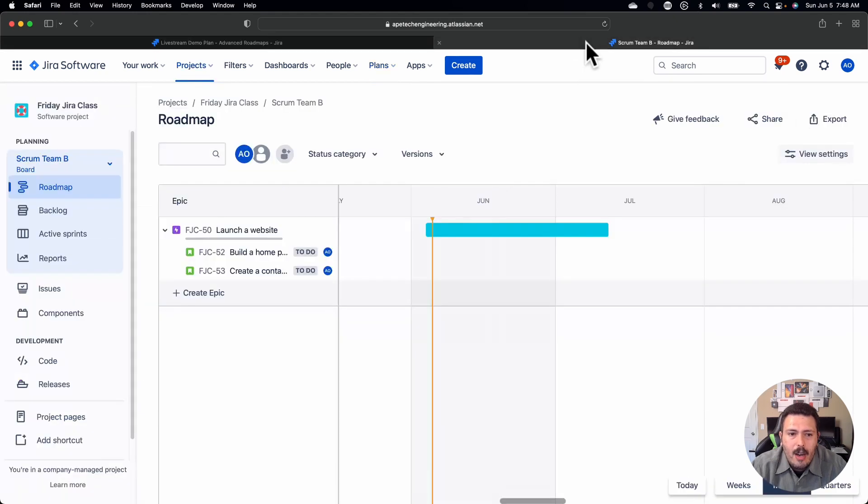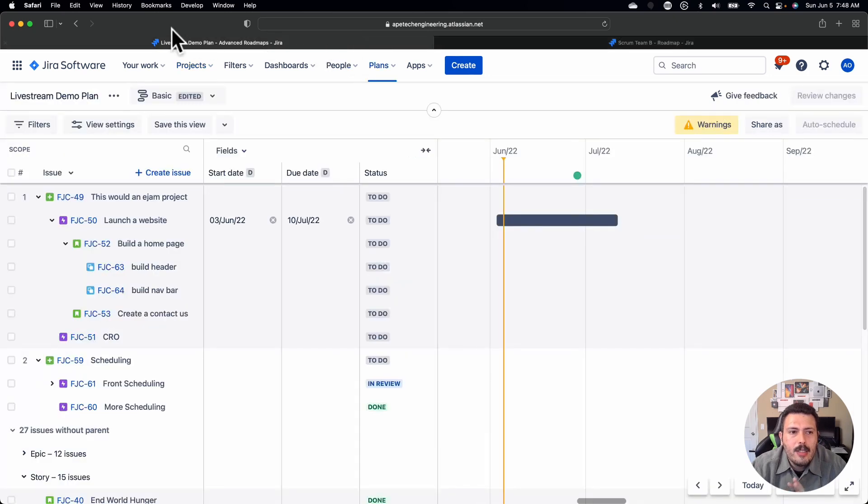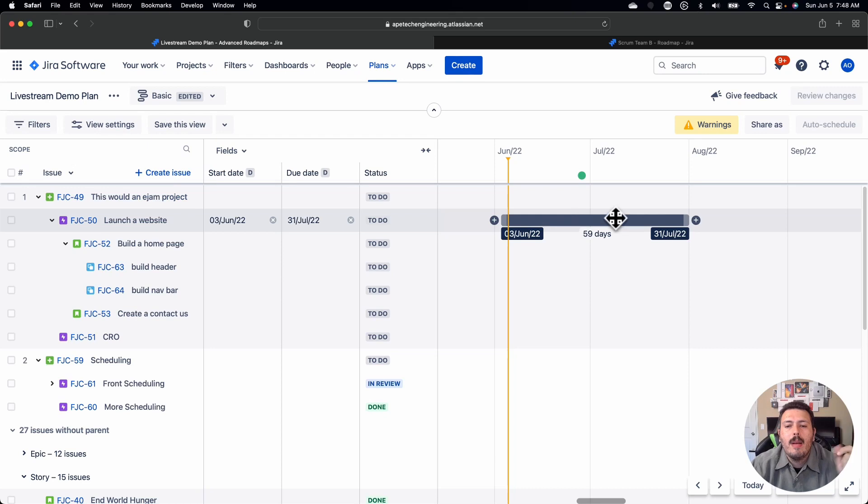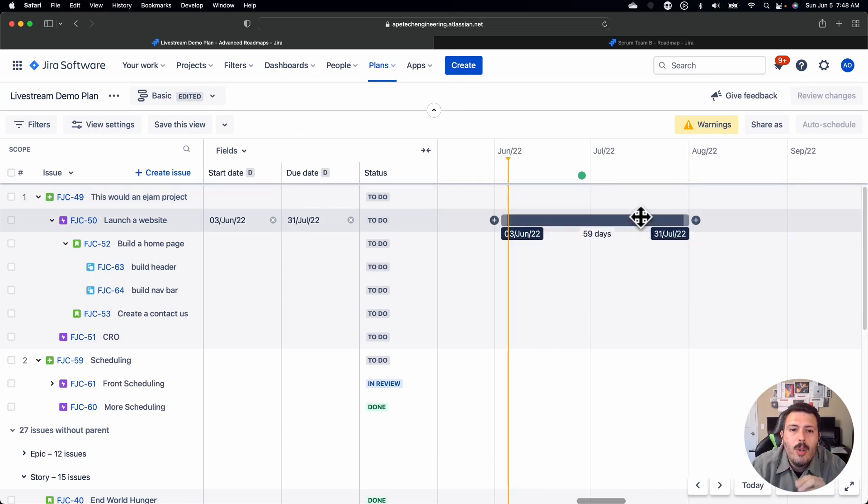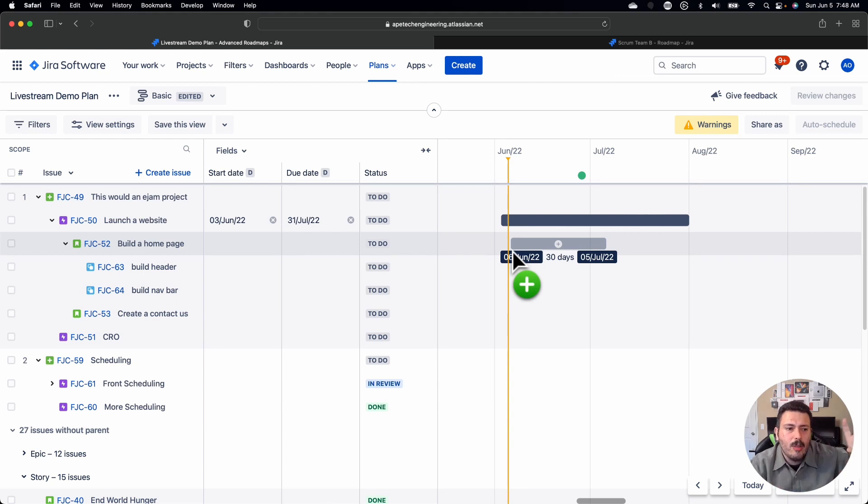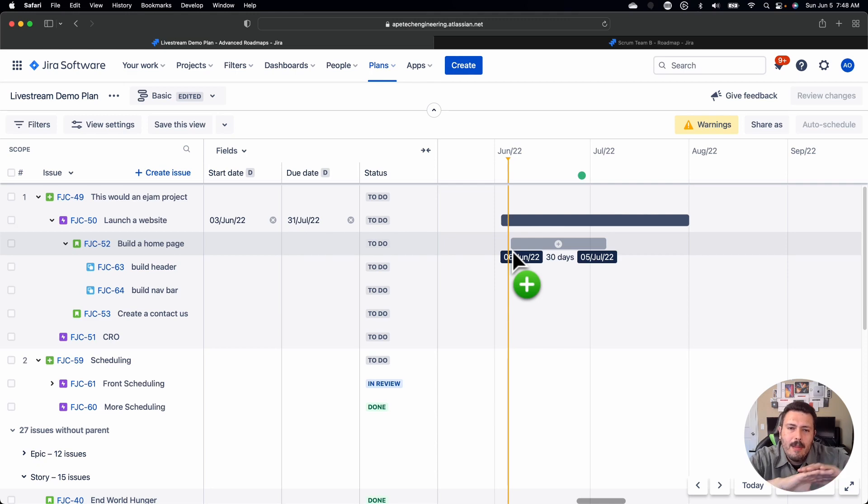And you'll notice that my dates for 38 days are automatically in my plan. Now, all I did was if I make the changes here in the basic, those changes after a refresh, get reflected in the advanced roadmap. Now, this is interesting and cool because you can essentially plan out. It's bi-directional. So I am planning out stories, epics, tasks, bugs, whatever you want. And I'm doing a more macro level session with the greater team.